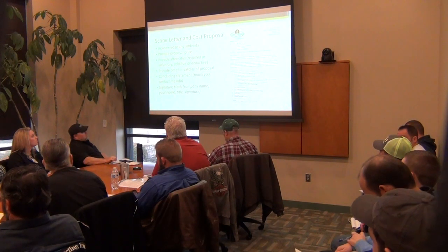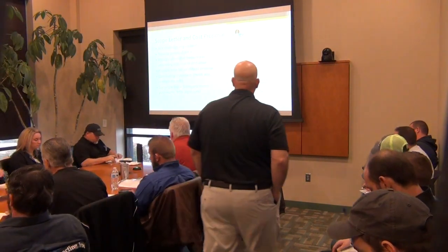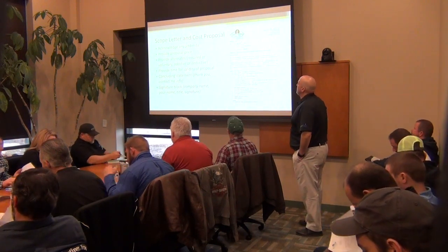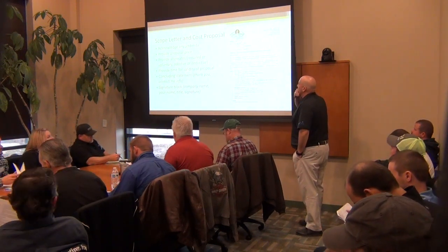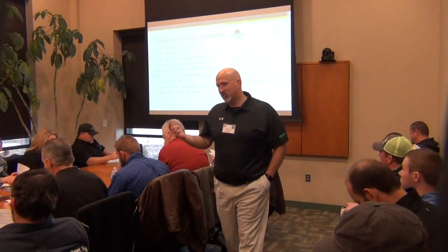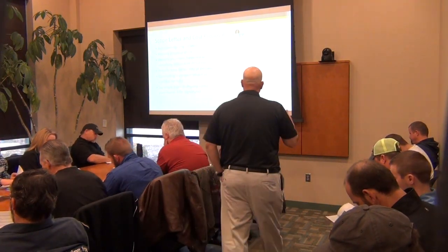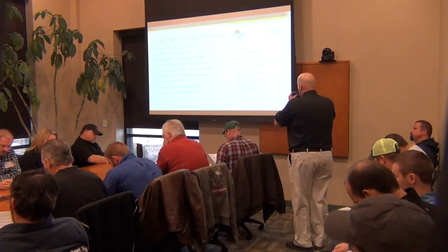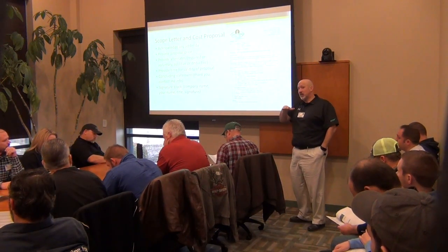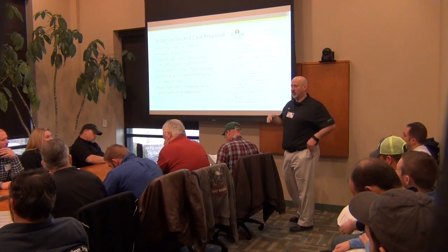On the second page of the sample proposal you got is kind of where those exclusions are. I can't see it here, but what you're not going to do is almost more important than what you are going to do. Because if there's something you're not going to do, you need to know about it and plan ahead. And again, it may be something that, if you can't do it, does affect how you look at it. But maybe we really need you to have that and you don't have it.